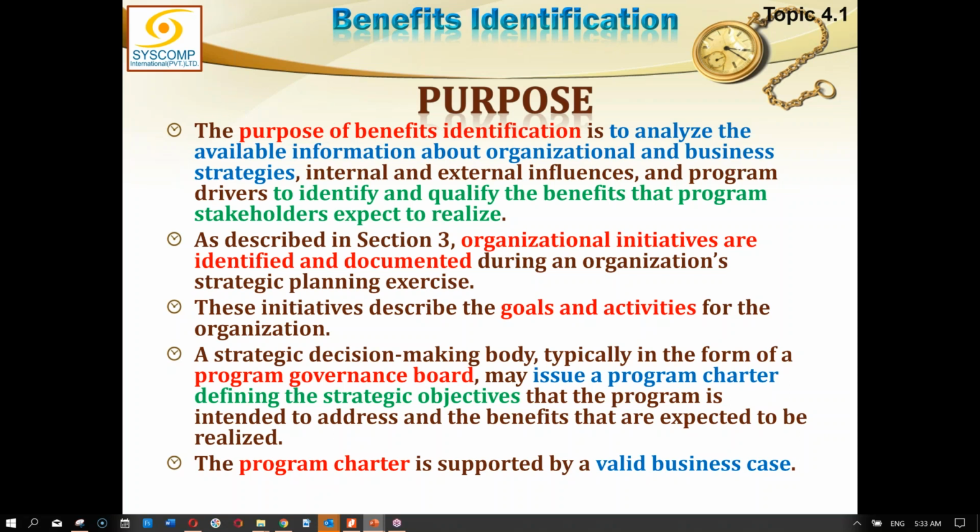But having said that, I do agree that as we move ahead in the life of any project or program, we learn more things. So when the business case was developed, we may not have known so many facts which will be revealed once we move ahead in the life of the program. Especially, for example, when somebody is trying to create a charter, he realizes that the business case might be further enhanced if these specific aspects can be included in it, and then the case can go back to the business case for improvement, and then the program charter will be created afterwards.